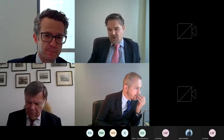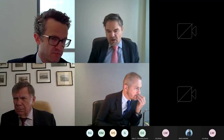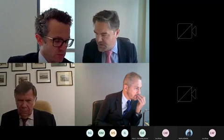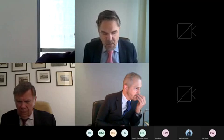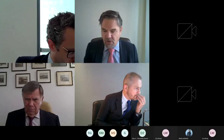I think it goes to the definition. As I've said, the serviced apartments, in my definition currently, are under the hotel inventory. Look, if we can agree to disagree, my definition is right at the moment. If it transpired through the design process that these became serviced apartments that required the ratio of 1-to-1, then it would have to change, and absolutely the cost would go up.